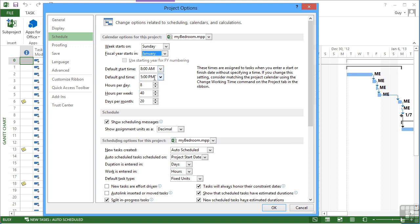How many hours are there in a day? Now if you actually enter a task as four hours, then it's four hours long. If you enter a task as half a day, then it's this value here that determines how many hours half a day is. And it may be that your working days are not eight hours long - they are seven and a half or seven - and you need to work to those exact variables because when you're calculating the work costs, it could make a difference, that extra half hour a day.